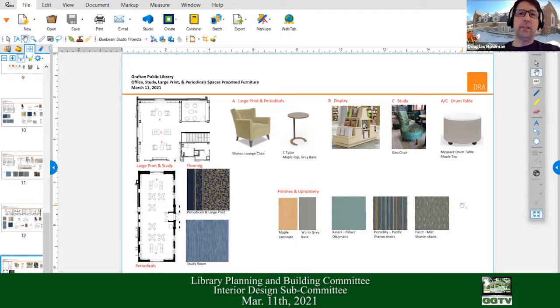Yeah, and I'd say the same thing with the shelving. If there's some shelving, it makes sense to get it now when we can get part of it reimbursed. But to Beth's point, the MBLC is going to compare what we end up with to what the grant application said. If it's a new chair or a used chair, that's fine, but you can't say we're only going to put half the shelving in, or eliminate the office furniture here. You might have a few more items than in the grant application, but I don't see you having certainly 40% more.